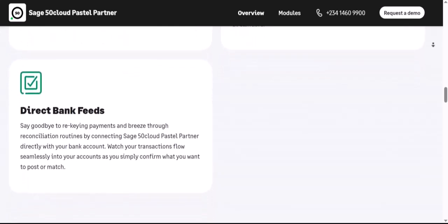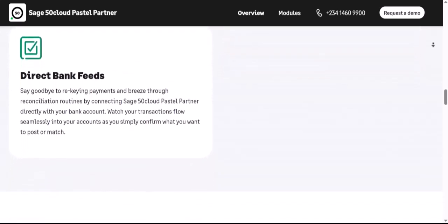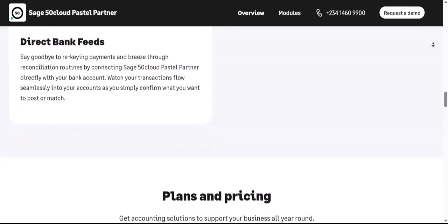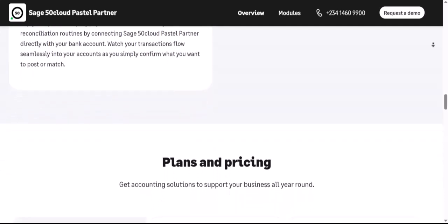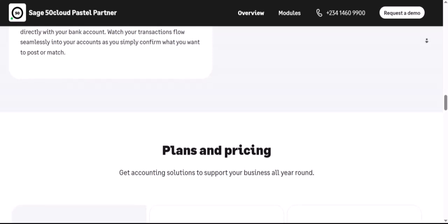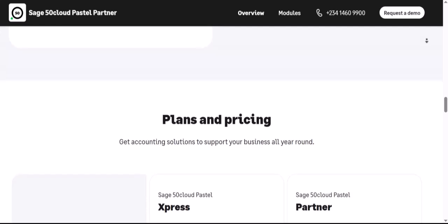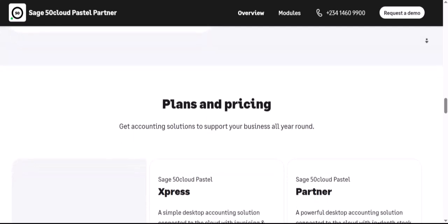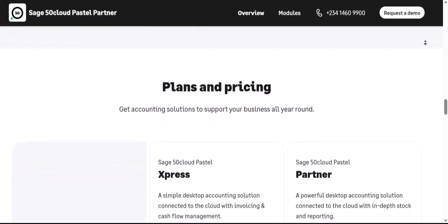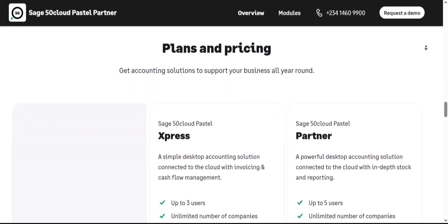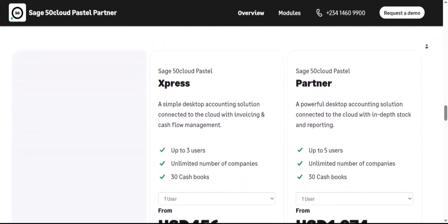Considering these factors, a typical Sage Intacct implementation for a small to medium-sized business with relatively straightforward needs can range from 3 to 6 months. However, more complex implementations for larger organizations with extensive customization and integration requirements can easily extend to 6 to 12 months or even longer. It's important to remember that these are general estimates.